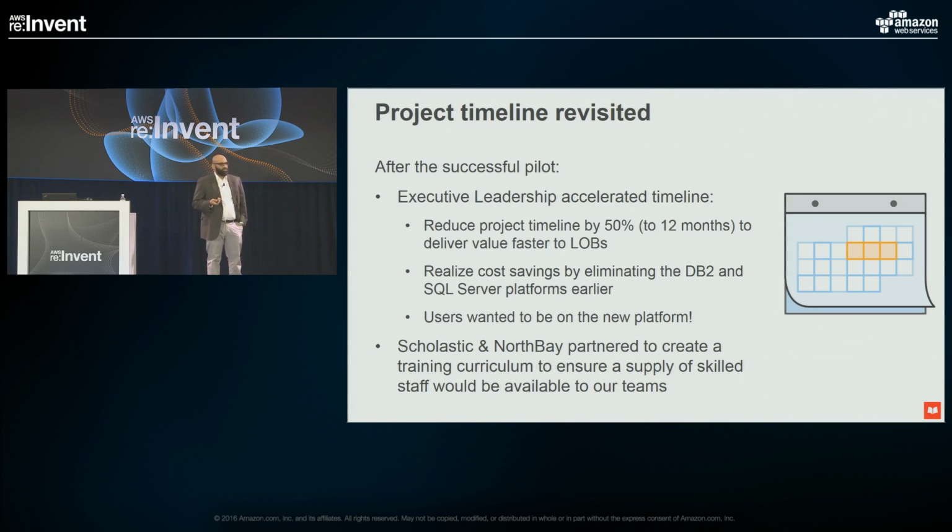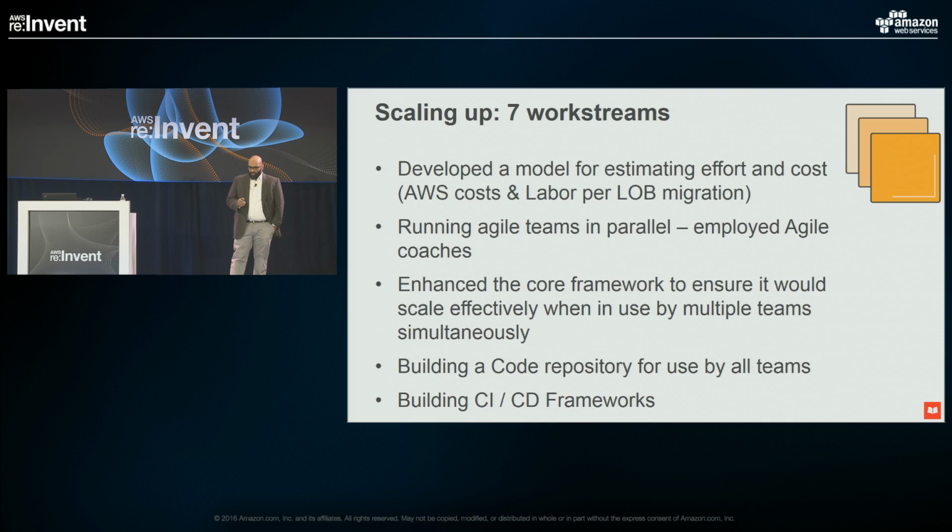Our immediate concern in collapsing this timeline was, where are we going to find skilled staff? Where do you find people who know AS400 and SQL Server and Amazon Redshift? So we worked closely with our consulting partner, North Bay, and we co-designed a curriculum and a training program so that when folks were coming on board, they already had the skills, and that helped a lot.